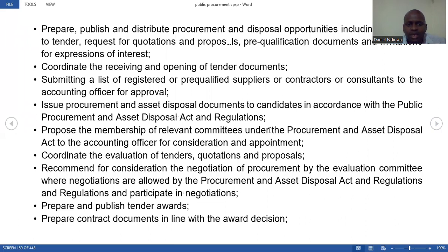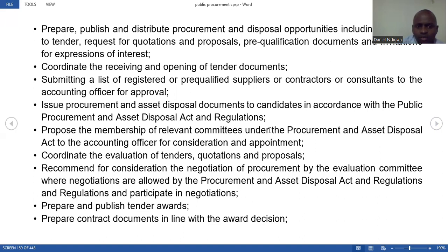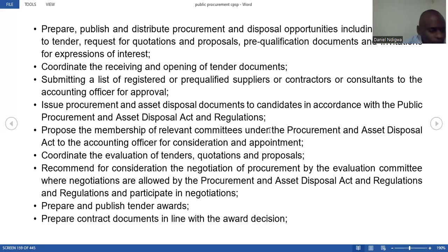They coordinate the receiving and opening of tender documents after the submission deadline. They also submit a list of registered or pre-qualified suppliers, contractors, or consultants to the accounting officer for approval. They propose members of relevant committees under the Procurement and Asset Disposal Act to the accounting officer for consideration and appointment. They also coordinate the evaluation of tenders, quotations, and proposals.